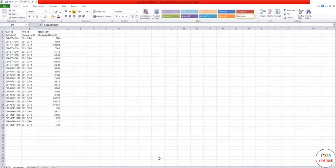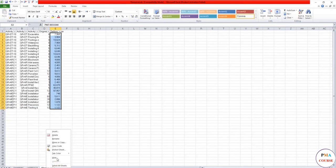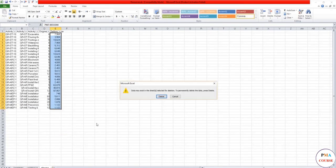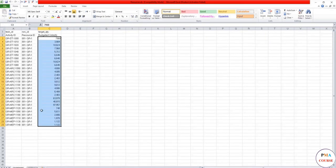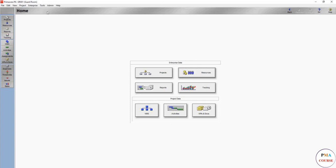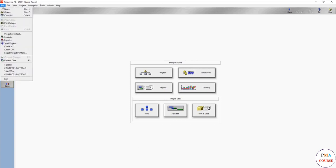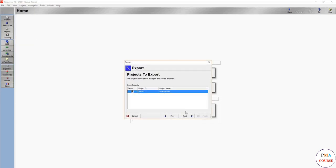So now, first save. And please, before importing, remove anything that you have added before, because the P6 is a very delicate file. And also make sure, as much as possible, to export the project and keep a copy, because it might - if something went wrong - so keep a copy.